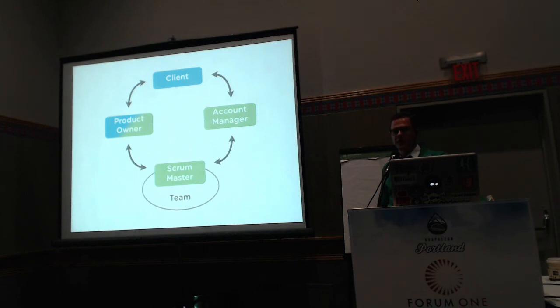We have a dedicated person, our director of technology, Mike Nienkerk. His job is to be a technical consultant, to ensure the professional health and development of the entire team, and to plan all of the resources. There is a 3-hour resource planning meeting every Monday morning, where he and the project managers, who are product owners or scrum masters or a whole bunch of different people, and our director of client relations sit in a room with this big crazy spreadsheet and try to figure out who's going to be doing what.